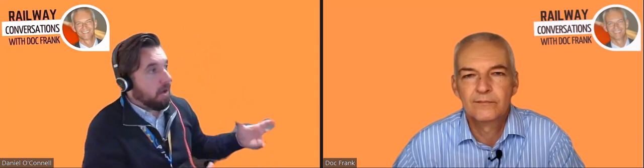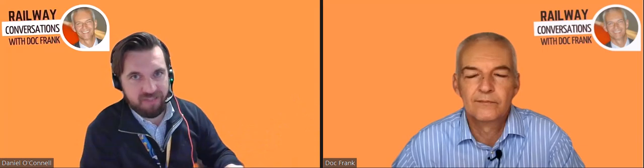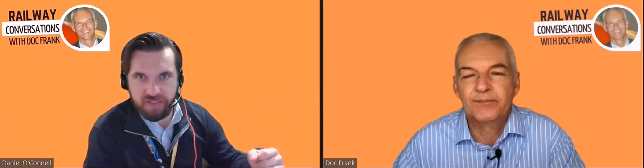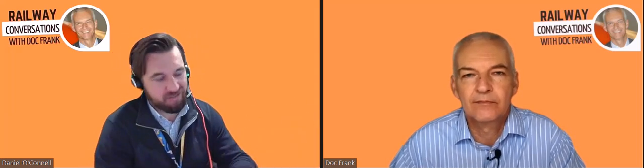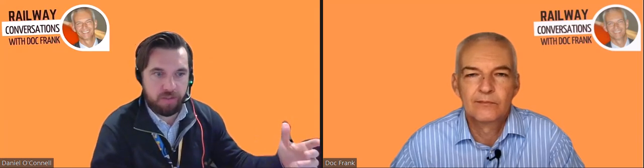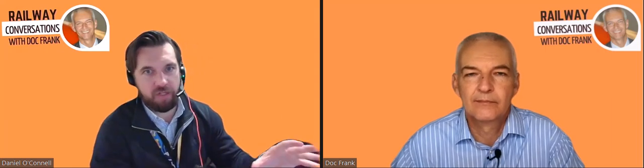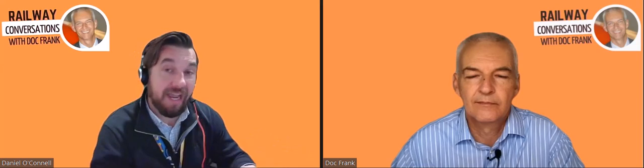And then the final part of that test campaign of them principles is when we go into multi-train testing. So demonstrating close headway, demonstrating safe separation, squadron testing. What happens if the train in front stops? What is the impact? What are the recovery rates? And the final part of that is what I call dynamic integration testing. So when we demonstrate all of the systems working in unison as they should, but what happens in degraded mode scenarios? Let's get reliability. Let's make sure that we're testing as much of the infrastructure and as much of the time that we can, basically, as well.